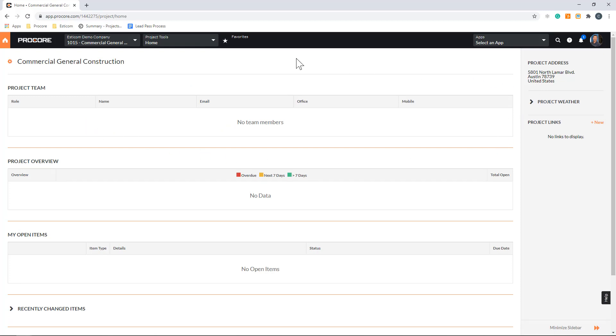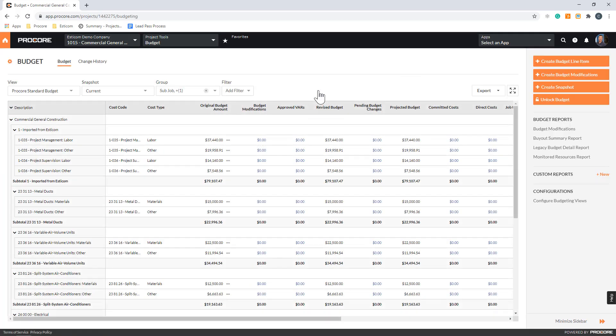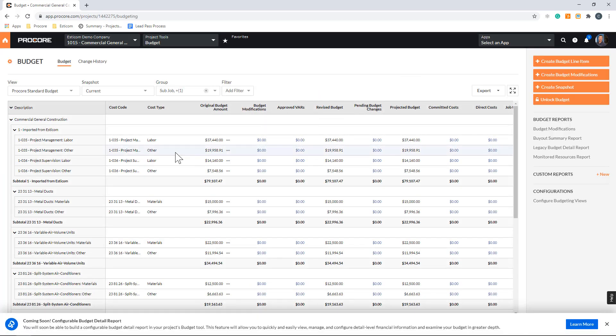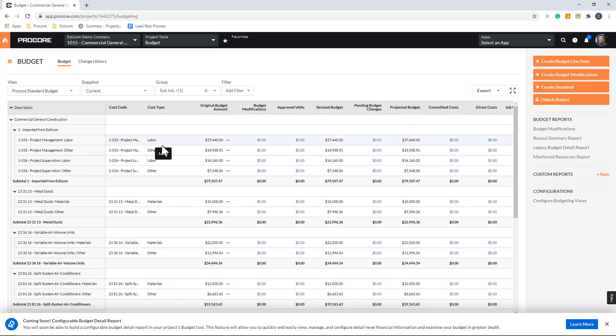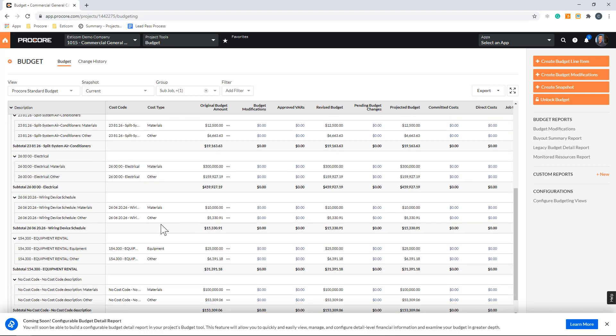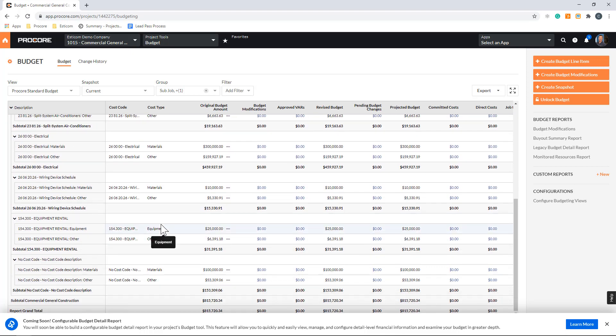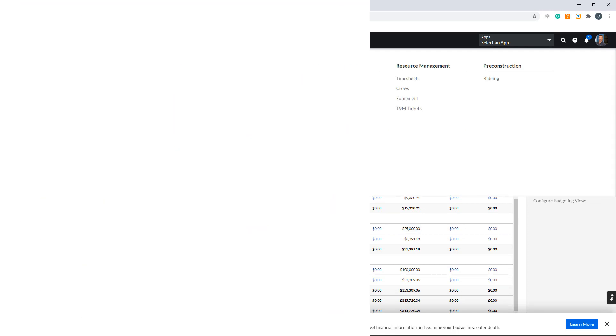Now let's take a quick look at the project budget. Here you can see the estimated budget broken out by cost code and cost type. This will serve as the foundation to creating our prime contract and schedule values, saving time and avoiding any duplicate data entry.